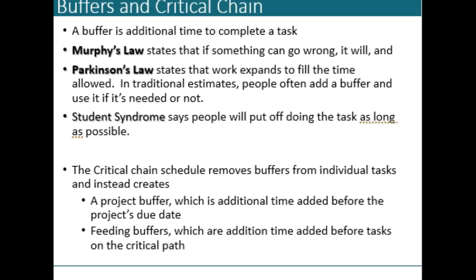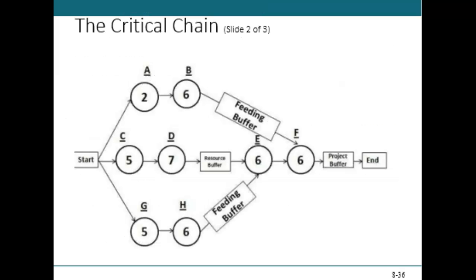And there's a summary of the buffers in critical chain. Here's a picture of it that I like a lot. It looks just like critical path method, where you will determine a critical path. But critical chain says, look, these non-critical path items have feeders and they have buffers. And I'm going to take those buffers and move them to the end of my project. I'm trying to limit the float or slack on these other activities and make them as tight, really, as the critical path. Keep this whole thing clipping along. And to do so, I'm managing my resources all the better.